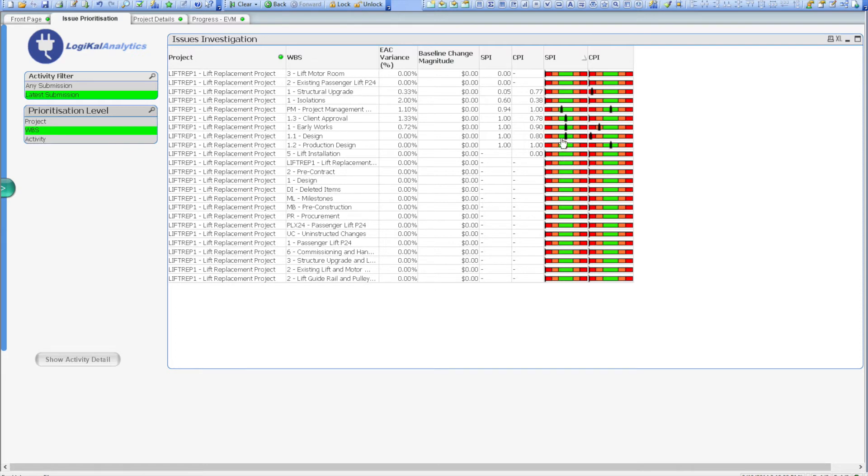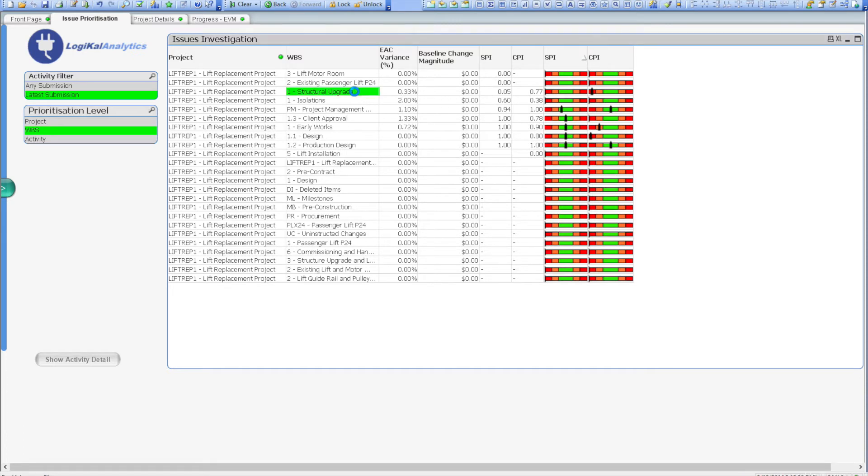The first two records have an SPI of 0, so as a manager I'd assume that these have not started on plan, and are most likely delayed due to another area. So for the moment my priority will be to focus on the third element, structural upgrade.